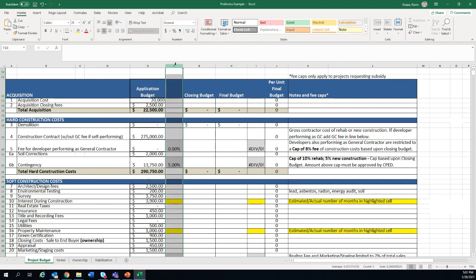One thing about the city's gap financing is that we're providing it as a 0% interest deferred loan. And it can be the first source of financing into your project. So what that would mean is once you close on financing from the city, you can submit a draw to cover any costs that you've had that are eligible. And we encourage you to do that before drawing against construction financing that you may be using that has interest, because that would then save cost over time for your project.